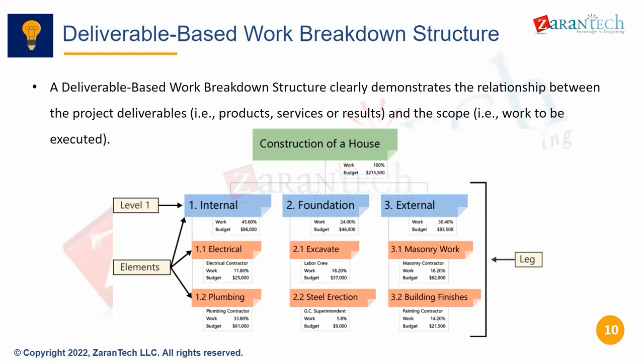No, but without the foundation, we cannot have internal and external, right? Yes, that is what I'm saying. So this is just the WBS structure, and here they are independent. There is no relationship like internal cannot start till you complete the foundation, or the external cannot start till you complete the foundation or internal work, or vice versa. For that you have network activities, with the relationships and binding, how much duration it will take, which are predecessor activities, which are successor or following activities. That is done in networks and activities, and we will see that in that session.